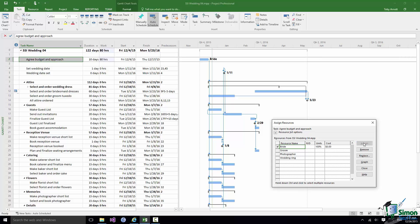Now when I assign a resource to a task like that it doesn't automatically close the Assign Resources dialog. You note there's a separate Close button. But what you can see is first of all the number of units. Well 100% represents one Bride so there's one Bride attached to that task which is just as well really because we only have one Bride available. And the cost of the Bride working on that task is zero. Don't forget that the rate for the Bride chargeable to this project is zero dollars per hour. So if she's working on that task for ten days then she's still not going to charge us any money for doing it.